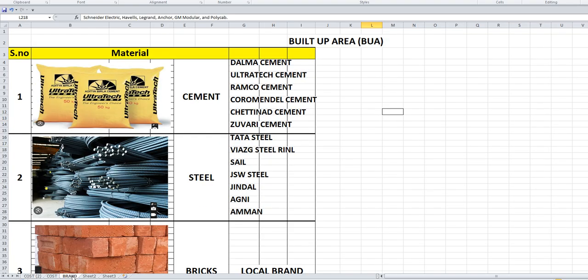and local factors like labor and material costs. Some brands are more familiar and famous in the local area. Those brands and costs also affect the construction costs, and so does the local practice. The availability of local material and the practice is better suited for the construction. So these factors also considerably vary the construction cost.